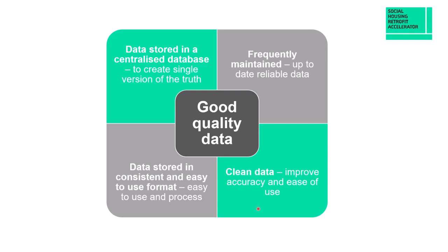People believe that they have good quality data from EPC surveys. You look into the database and you find that 50 properties have got absolutely identical EPC data. That doesn't seem very likely. So you need to check, you need to be looking at your data from fairly early on because it takes a bit of time to fix.